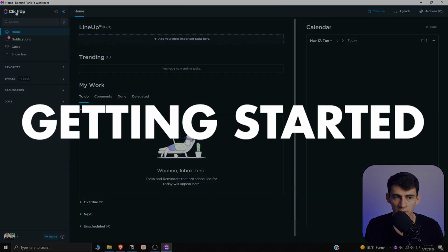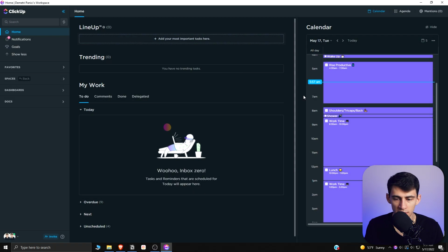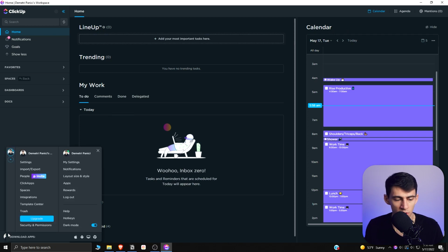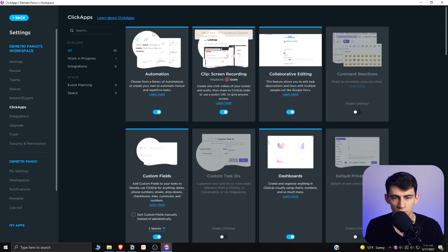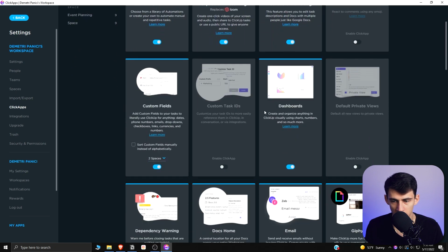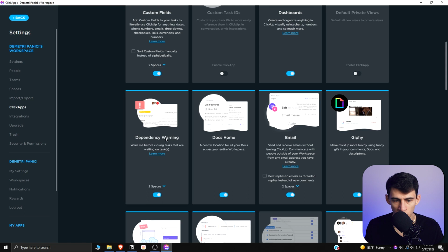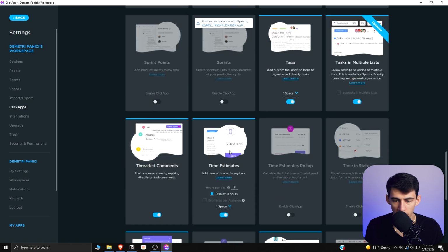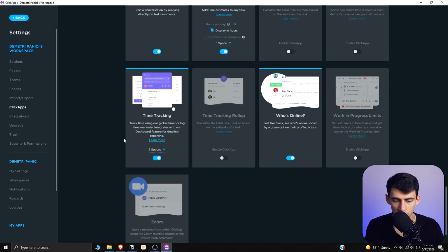So jumping right into ClickUp, when I get here, you'll see that there is a home view that works really well with a Google Calendar sync, which I'm going to show you how to use in this video. But essentially, if you want to get started, I would recommend going immediately to the bottom left and going to ClickApps and making sure a couple of these things are enabled. I would have automation enabled, collaborative editing, custom fields, dashboards, a dependency warning, Office 365 is nice, relationships, tags, time estimates, and even time tracking for those people who want to use that.